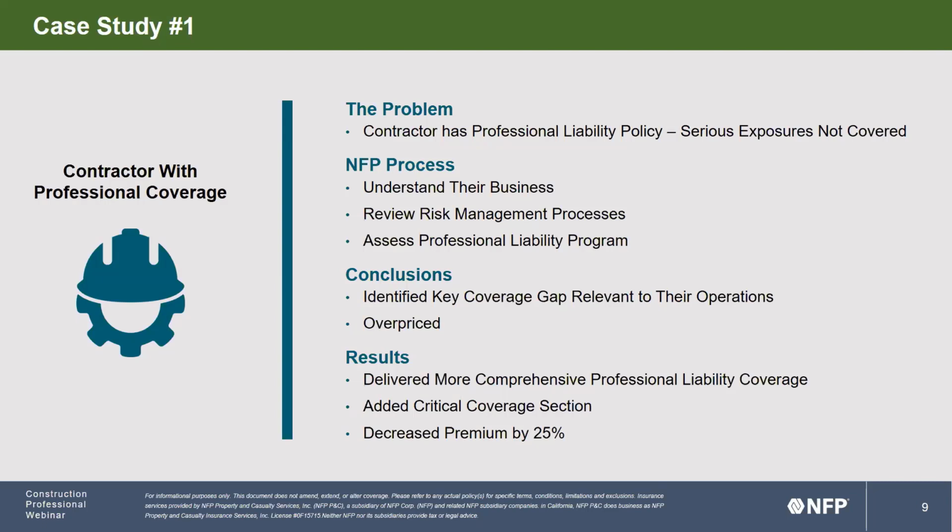Another coverage section is what we call protective indemnity. And that covers a contractor for their liability that arises from the acts of their subcontractors. This follows privity of contract. If you're holding the contract with the owner and there's a problem on the job, they're going to come to you to rectify that issue. If the issue results from the acts of one of your subcontractors, you still are going to be contractually responsible to the owner. You would turn around and presumably pursue an action against your subcontractor. In the event that their insurance is unavailable or insufficient to cover the loss, you, as the GC, could be held responsible for the remainder of the damages that their insurance does not cover. The protective indemnity coverage provides you additional protection for your liability that arises from the acts of your subs.